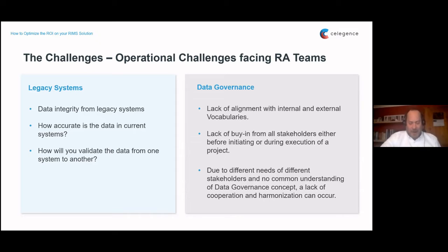Think about how accurate your data is within your current system and whether or not you need to correct that data before migrating it into your new system. I would highly recommend performing a cleanup of your data prior to migration. There is nothing that will stall the adoption of a new system quicker than having incorrect data from the very beginning.